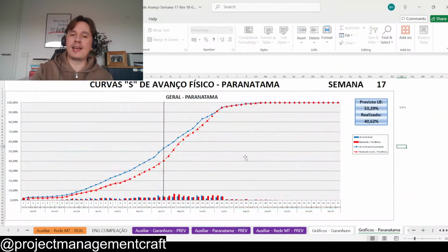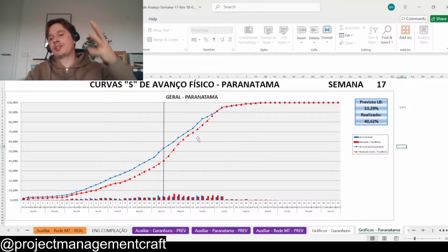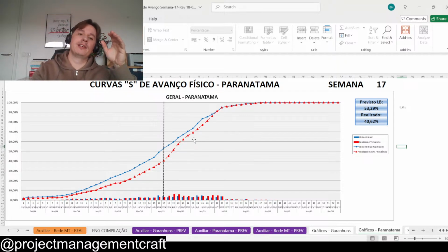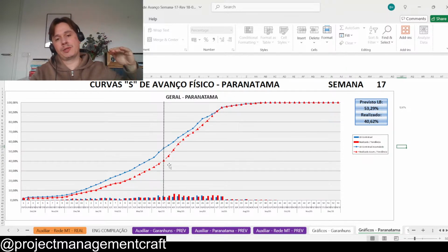And why did I not want to do that with my team? Because I've seen several projects get delayed, so they negotiate, they review the baseline. They get late, they negotiate, they review a baseline, and at some point this curve starts to be very steep. So it's 0, 0, 0, 0, and one day it needs to be 80%. Then you get a steep peak there.